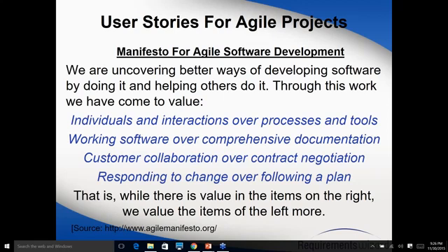Whereas in Agile, you are not doing all that upfront. As and when you come to that level, you will do some planning and some estimates. You're not trying to do the planning and estimates for the entire project in that phase. You're doing it piece by piece. It's also called rolling wave planning. You do some planning for the next two iterations, and then again for the next two as you come close to that point.